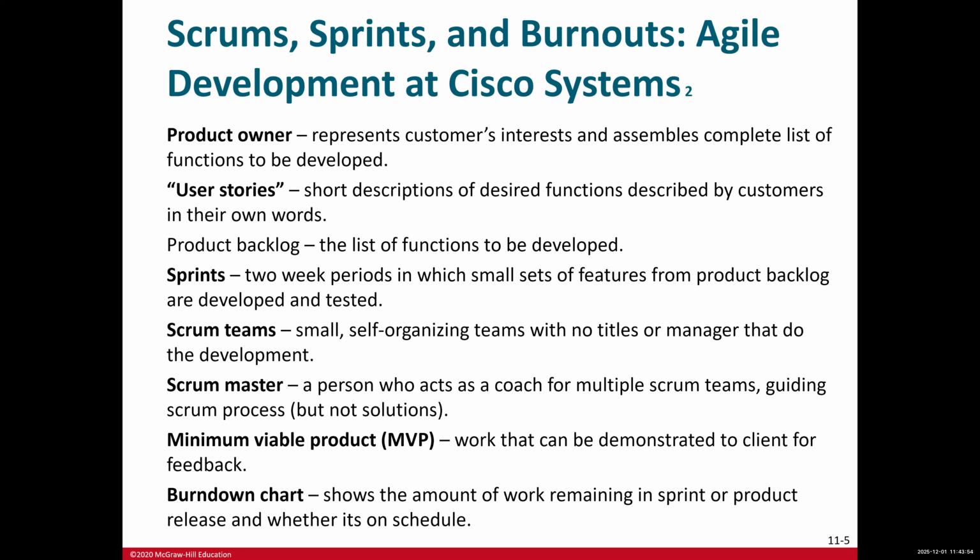For example, a user story might look like: as a user, I want to be able to log in using my Google account, so I do not have to remember another password. That simple, right? These user stories help to ensure that developers understand what the customer actually wants and needs, and can work on features that will add value to the customer and to the product.